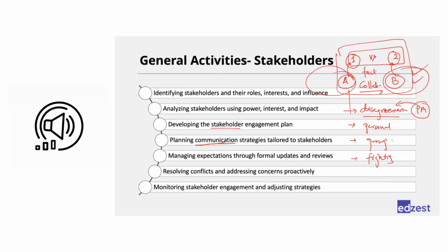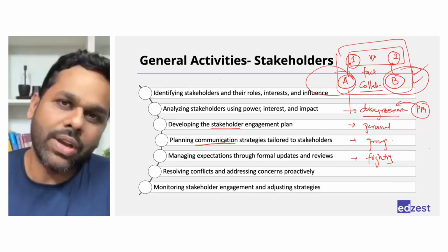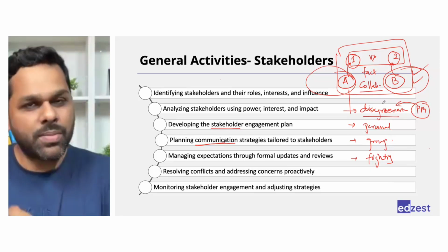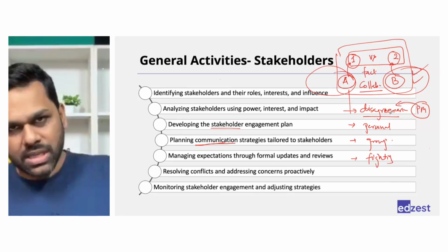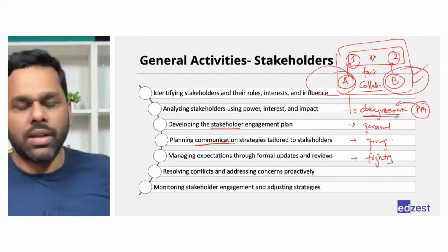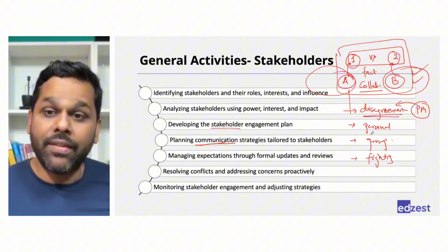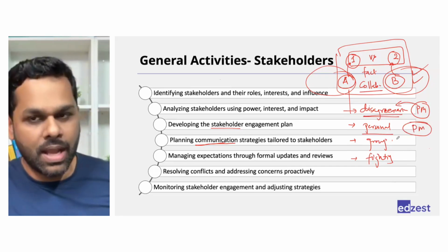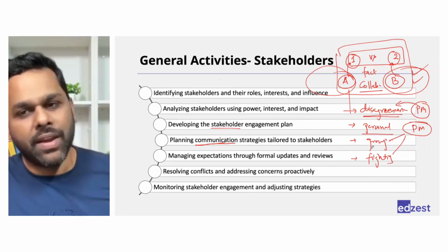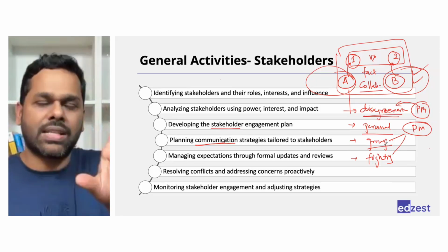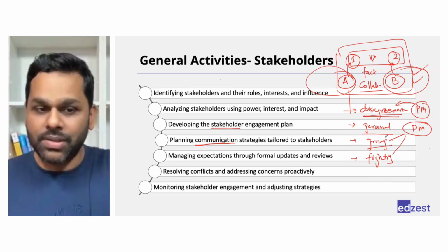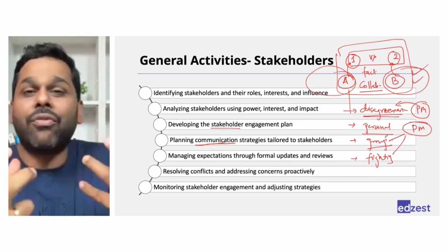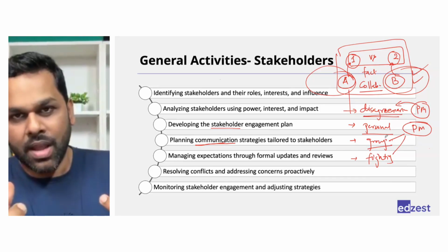Why do you not agree? What is your point? Why do you think this is okay? Why do you think that is okay? So the project manager will ask the right kind of questions which will help them resolve the problem. If it has become personal, definitely the project manager has to be involved, or if it is a group or fighting. If it is a group, then reassignment of tasks happens, because if group formation happens, there will be a gang formation in your project.